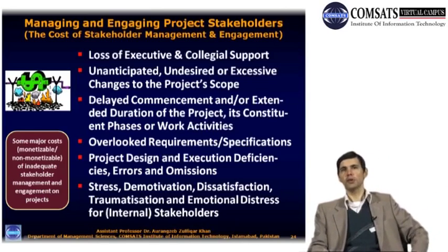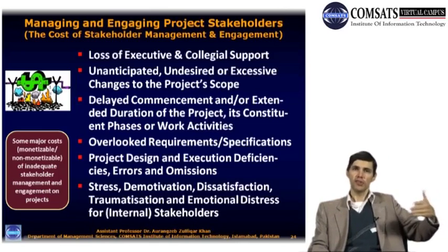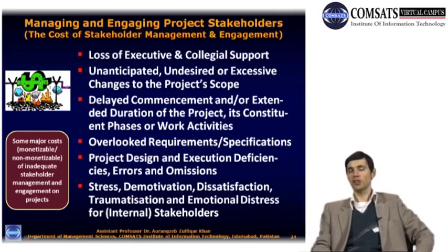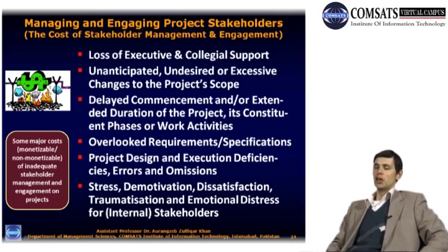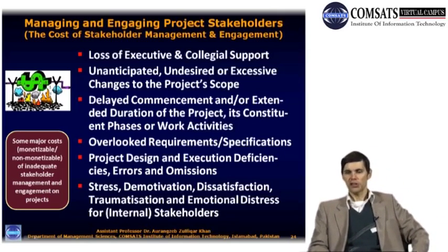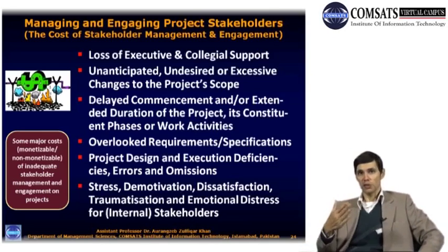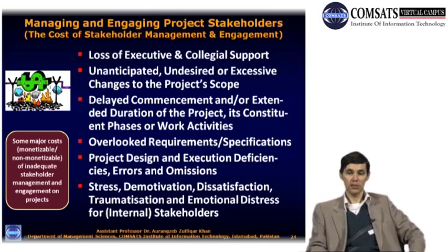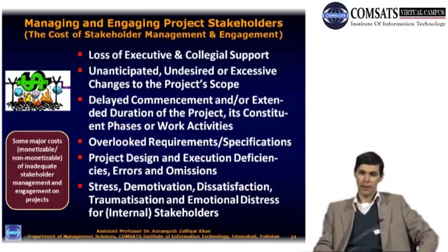If you do not properly consult with your clients, for instance, or your customer, what do you want? What do we have to do? If it's not done very systematically, what could happen is that some requirements and specifications might not be documented by the project team, by the project manager. The project is undertaken, and then later on it's found out that these requirements and specifications have not been met. Well, the reason they have not been met is there was not enough interaction with the stakeholders, or systematic interaction with the stakeholders. So this is a loss for the project because it has cost and time implications.